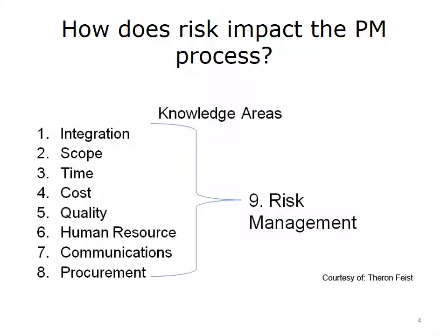Risk is one of the nine knowledge areas for project management, and its processes impact the activities of other knowledge areas throughout the life cycle of the project. An example of risk affecting other knowledge areas could be in the development of a warning to the provider that a drug pair is not being cross-matched for interactions. Changing the system to include this warning will increase the scope, as well as the schedule and budget, and it may not add to the quality of the information provided to the ordering doctor. However, without this warning, providers may assume incorrectly that this drug pair was screened and safe to prescribe together. Which outcome has more risk? These are the kinds of considerations that you will include in your risk planning.